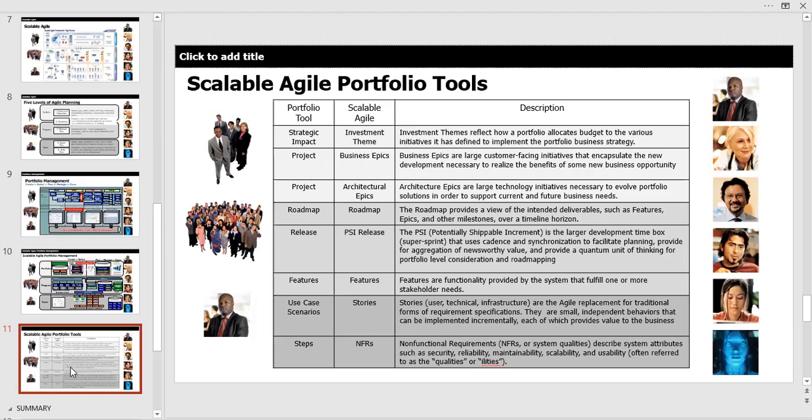I mean, this is the highest level thing that it's working against. We're going to get into more detail later on. I'm actually going to walk you through the process of demand management. But that's such an important concept. And for most of us at the lowest level, we don't really deal with dollars. Unless you're a director level individual, if you're staff, you're not really dealing with dollars. And in Agile, we're really not even dealing with durations anymore, because sprints are 2-week sets. They're already preset. And again, in Agile, your schedule dictates your scope. So you're pulling stuff off your backlog that you can fit into your sprint based on how you've identified it based on story points. Okay, we've covered all those, so I can't go through that again right now.